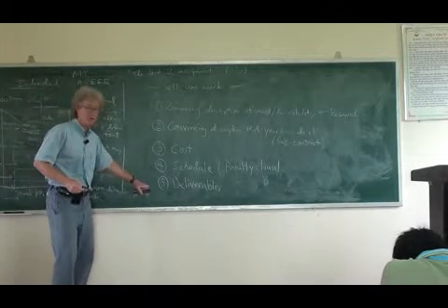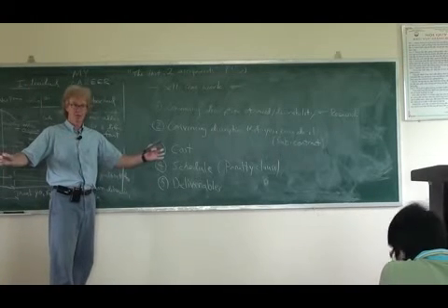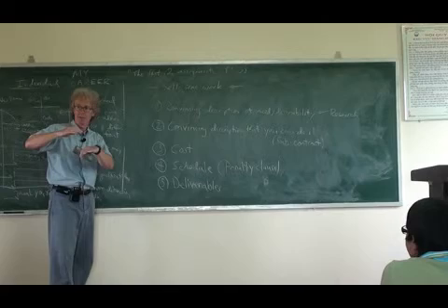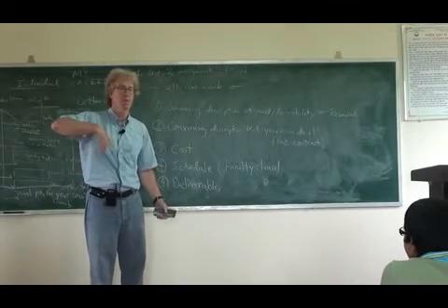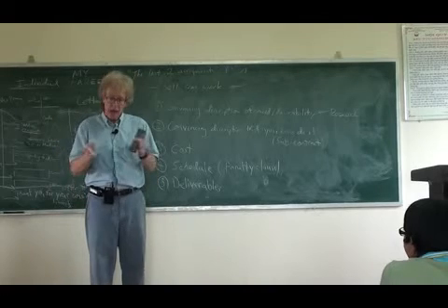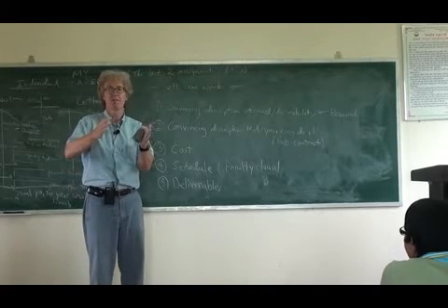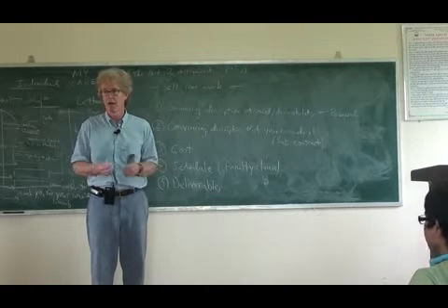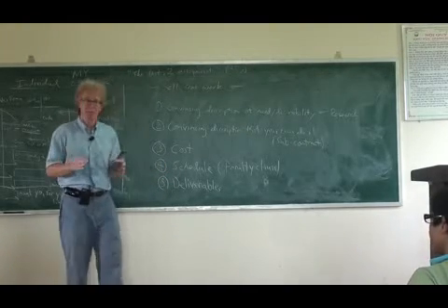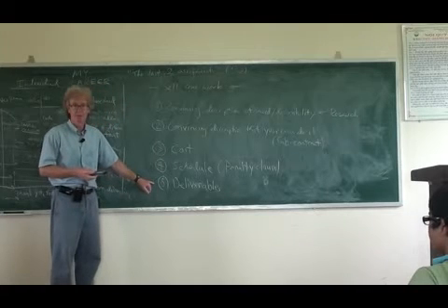In the contract, they're going to want to say, how wide is the road? Right? How thick is the pavement? What is the support? What is the maximum weight of the vehicles that can go back and forth on the road? How tight are the turns going to be? What's the maximum speed? If you make the road too curvy, cars can't go fast anymore. Right? All of those very specific things become part of the deliverables.